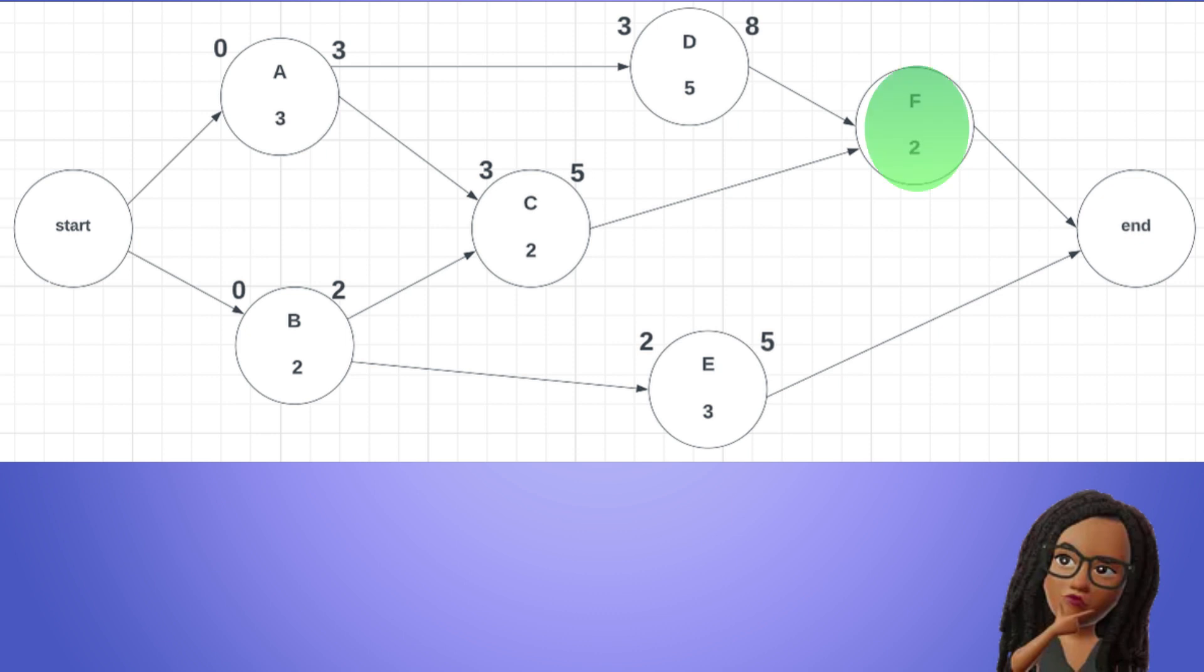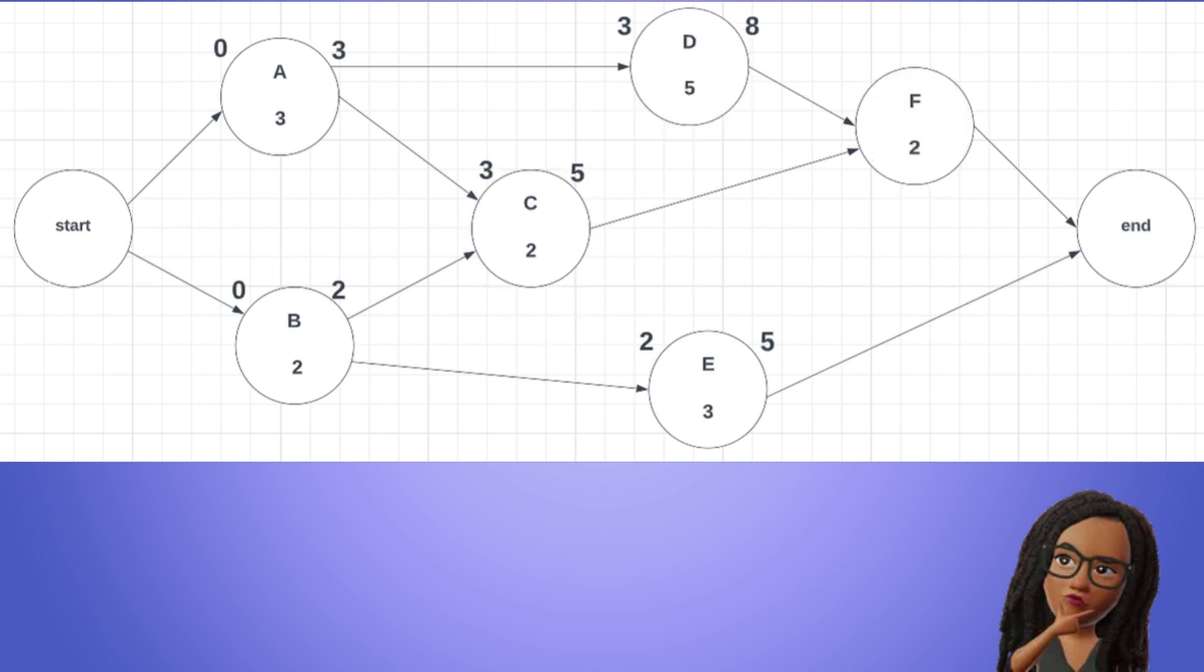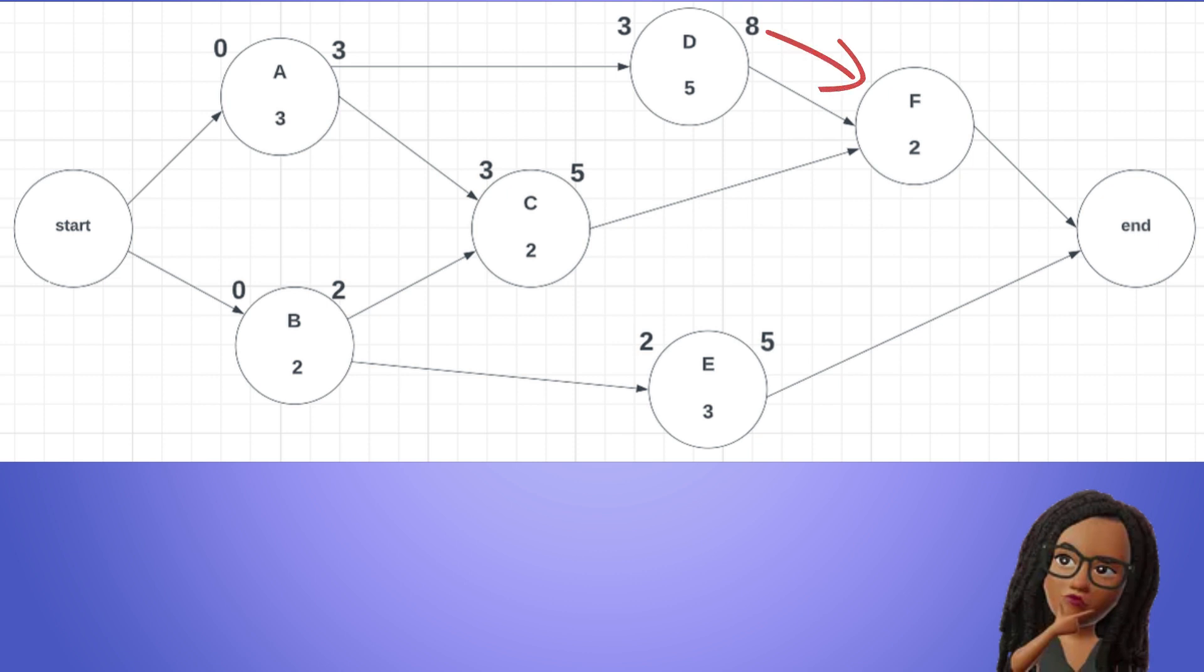Now F has more than one predecessor and we know that the early start of an activity is equal to the time when all its predecessors are complete. We see that C is complete at time period 5. However, D does not end until time period 8. Therefore, F has to wait on D to end, making its early start time 8. F's early finish is equal to 8 plus 2 equals 10.